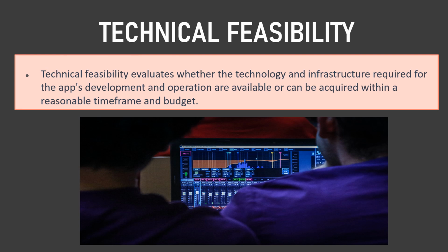acquire additional skills. Some of the aspects which can be checked are: do we have the technical expertise to develop the project? Is the required technology available and accessible? Are there any technical risks or limitations that could hinder the project's success? In our case study, Alex, with the help of the technical team, determined that they had the necessary expertise in mobile app development on both iOS and Android platforms, and that there were robust and well-documented APIs available for integrating with various payment gateways and restaurant databases.